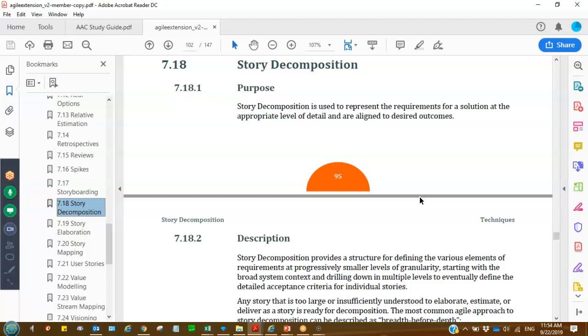I'm basically decomposing that high level heating system down into its components, and that allows me to focus on it. I can say when I'm looking at the heating system, these are the things that I have to look at, and if I keep decomposing it, I can drive it all the way down to, okay, here's a task I have to do: I have to order the appropriate pipe work from the plumbing store, whatever, those kinds of things. So what you're doing is just going from large to small.